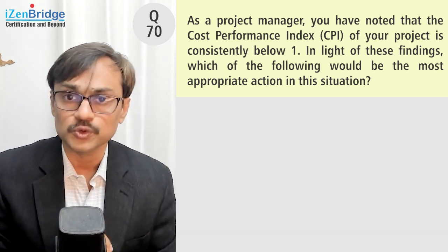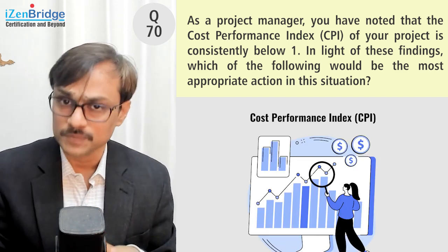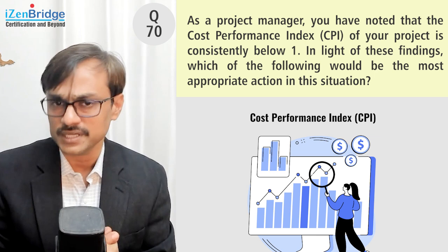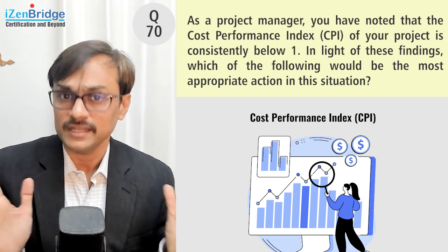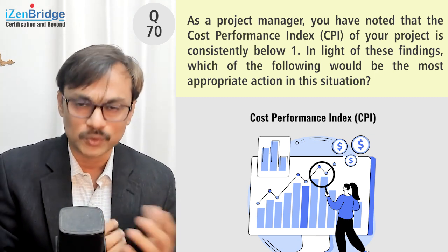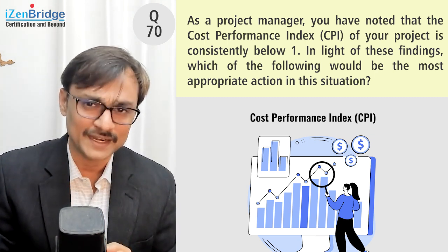You can expect one or two questions in the exam where the interpretation of cost performance index will come in. Nowadays, calculating the cost performance index is becoming a very, very rare occurrence. So don't worry too much about the calculation, but do understand that when CPI is less than 1, you are spending more money.